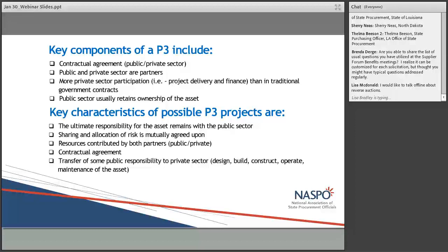So again, think of it as, the private partner is upfront financing, designing and building this facility for you. Upon completion and occupancy by the public sector, the public sector will begin making availability payments to the private partner to repay. So you can look at it also as, if you have a facility that takes $30 million to maintain, ultimately you want an availability payment that's more fiscally responsible than the $30 million you have to pay annually to maintain that structure, and factoring in the enhancements to make it a better facility for the public use.